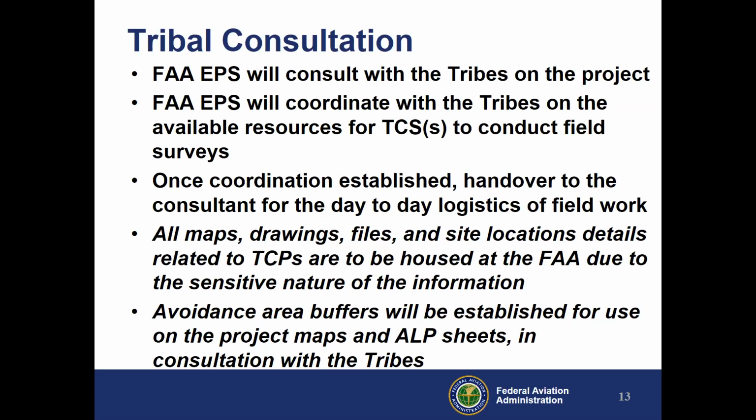It's very important for you to know that all maps, drawings, files, and site location data related to traditional cultural properties are to be housed at the FAA due to the sensitive nature of the information. And all avoidance area buffers that are established for project maps and ALP sheets are in consultation with the tribes. It is not to be left in the consultant's office or the municipal government offices with that site location data. All of that is retained at the federal office or with the tribes.